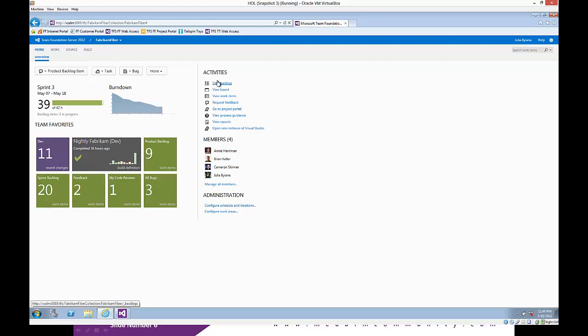So you need to be careful that you can't just say I want to stretch my sprint without actually modifying your sprint length. But we're not supposed to do that. If you're using the Scrum methodology and you run out of time, you remove the user stories that don't work or are not 100% done, and move them back to the backlog for the next sprint.